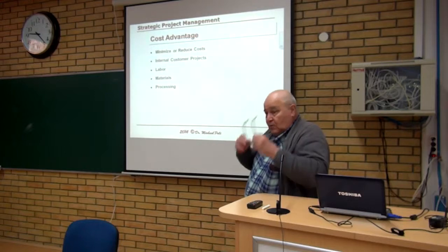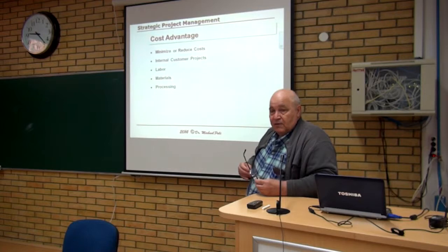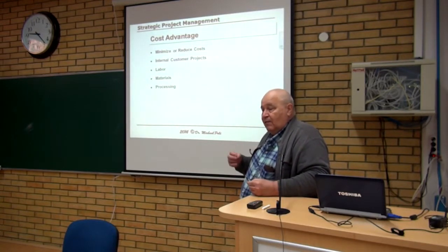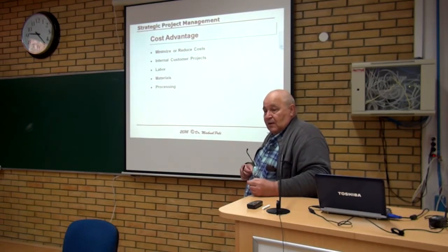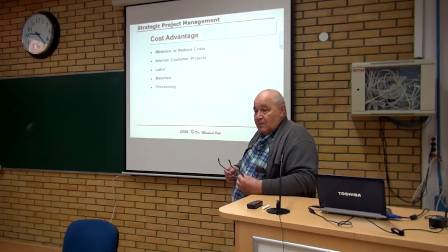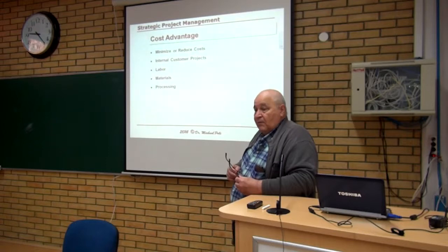One of the main things you do in a project is you create, design, and build a new product or service. There is an implication that there is a cost involved in delivering that product or service. There's also a cost involved after it is delivered. It's the cost of usage. And maybe later on, when you go to dispose of that product or service, there's the cost of disposal. So there are a number of costs involved with the product you build.